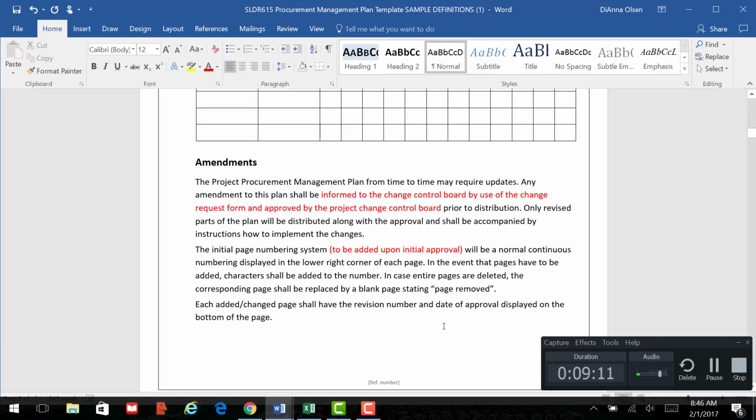You're communicating very effectively. Have you ever been in a project where all of a sudden you come back and you've got 6 change orders and your project is now $15,000 instead of 10? But guess what? Your contractors didn't tell you there were change orders because you didn't get to approve them. So now you're kind of stuck in this quandary of fighting with your contractors about, hey, look, I didn't approve this change. You didn't ask me about this. Or you said that you were going to change this one little piece, and now all of a sudden you have a change order at the end of the job for $3,000. That was like a $600 piece.